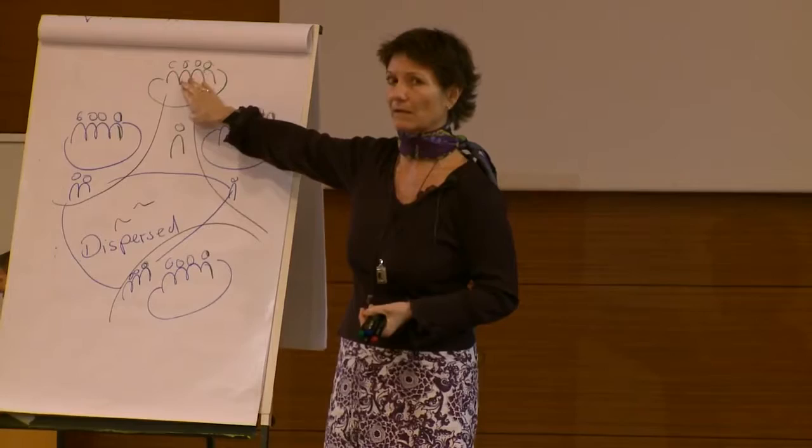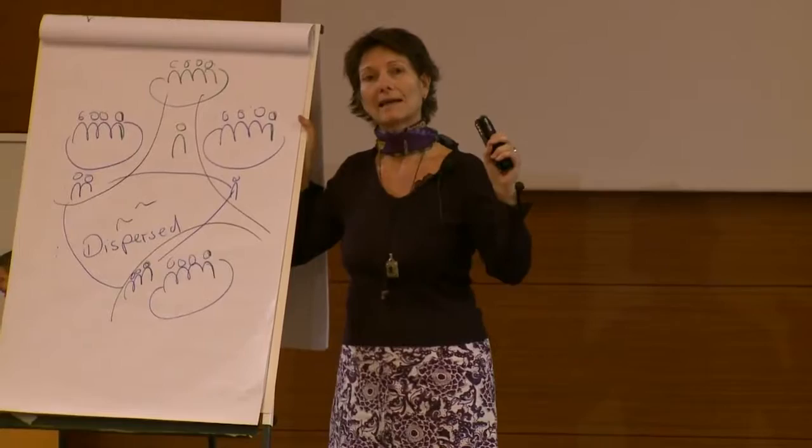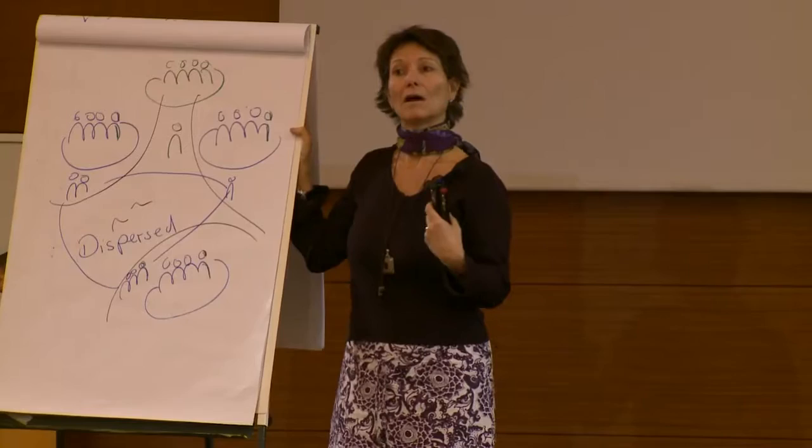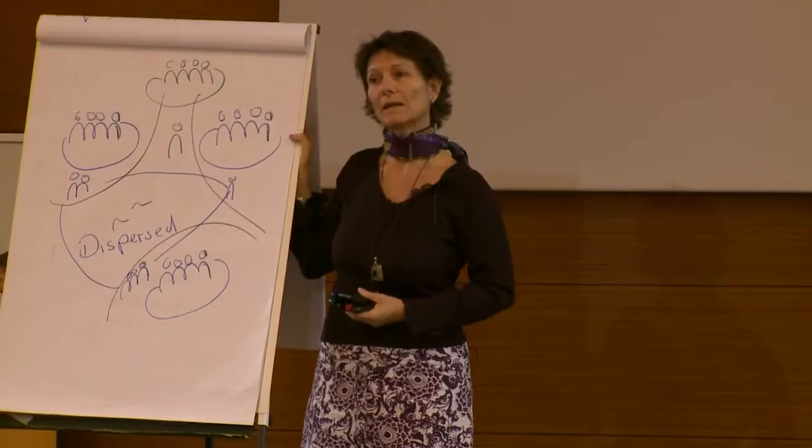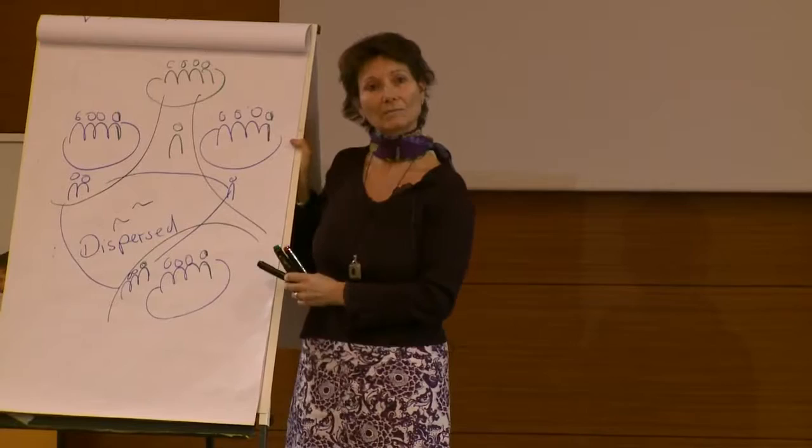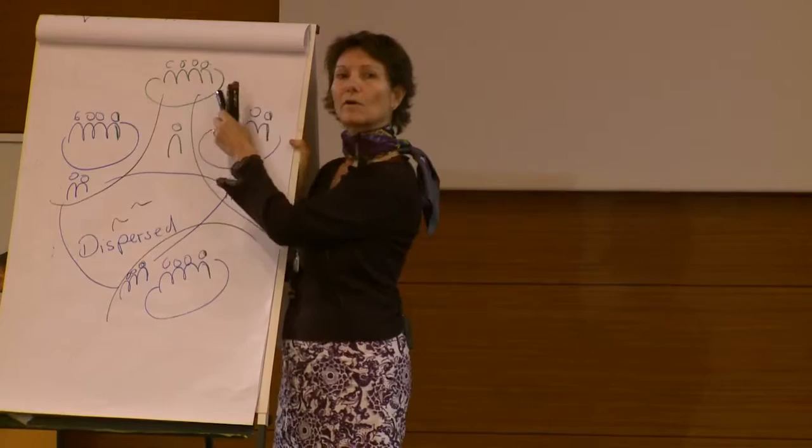And this technical service team, oh, this is what the bad thing is that I put it on top. It shouldn't be on top. It's not what I mean with this. I call it also a technical service team because it provides a service to all the other teams. So you can also look at this, well, if it provides a service, it has a customer. Oh, maybe it has many customers. The many customers are all these other teams, which also means all these other teams are filling the backlog for the technical service team and deciding on priorities.